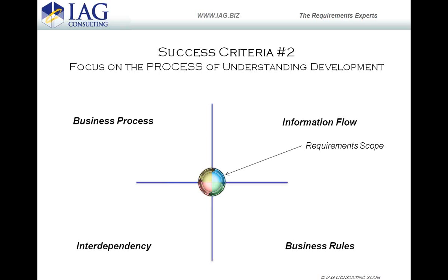For example, if you are only focused on the process flow and you don't go down into how to capture interdependencies and the business rules, you're not looking for things like, oh, I'm calling out from here to this other information system that's pulling this information. Oh, that's an interdependency. What information am I providing back? You're not asking, what information do I need at this particular decision point?